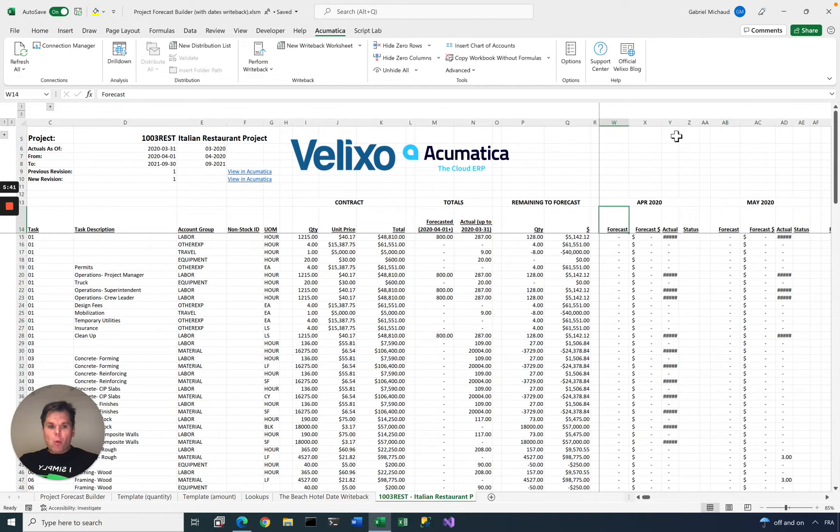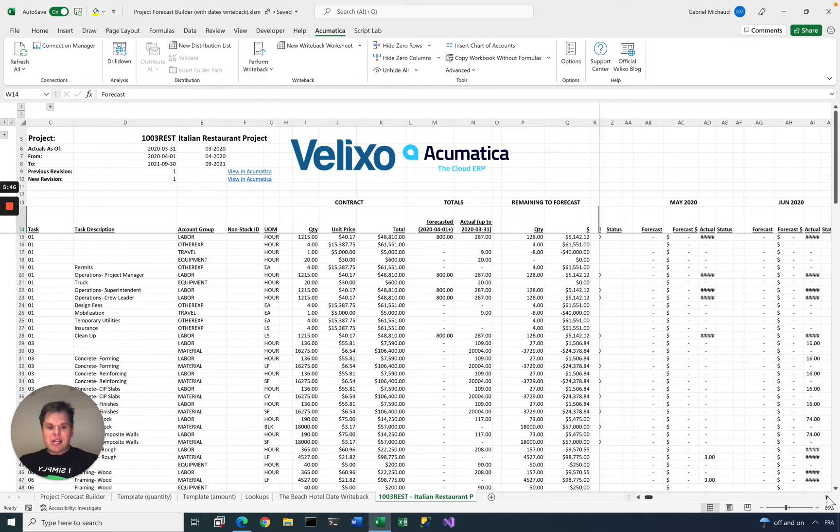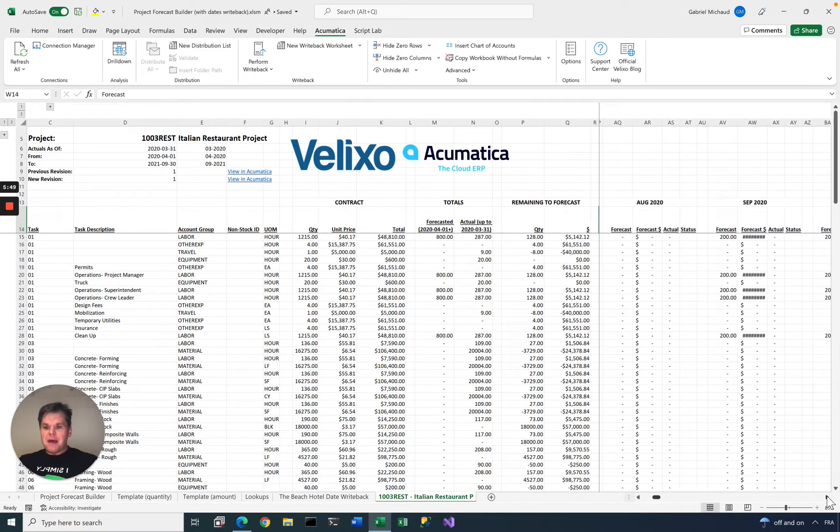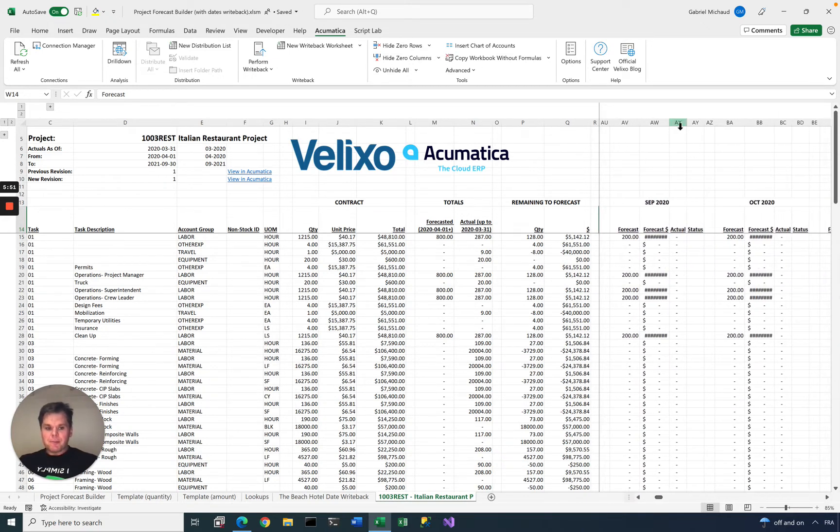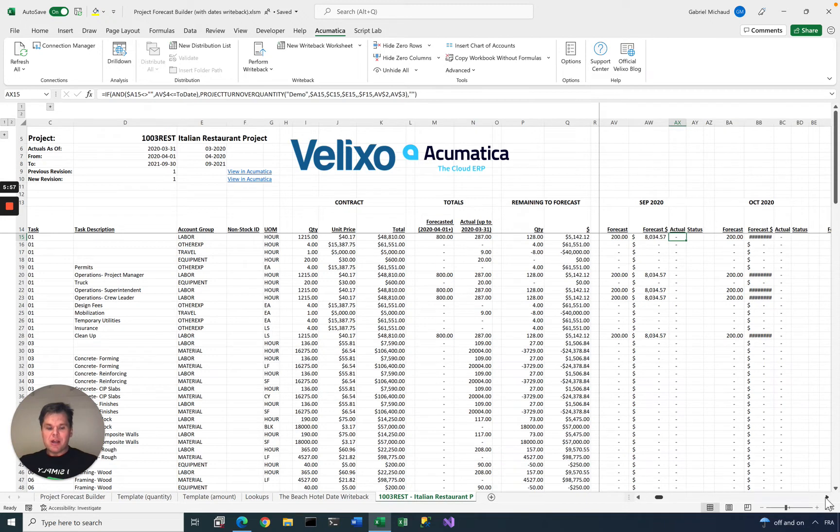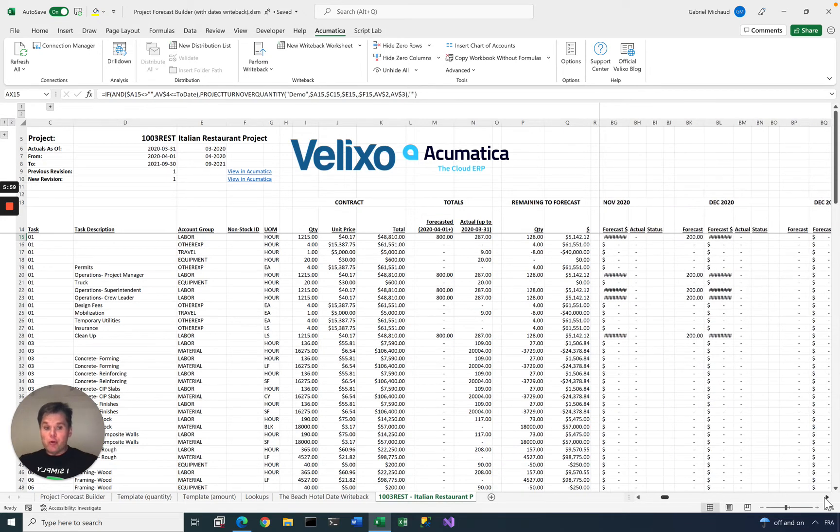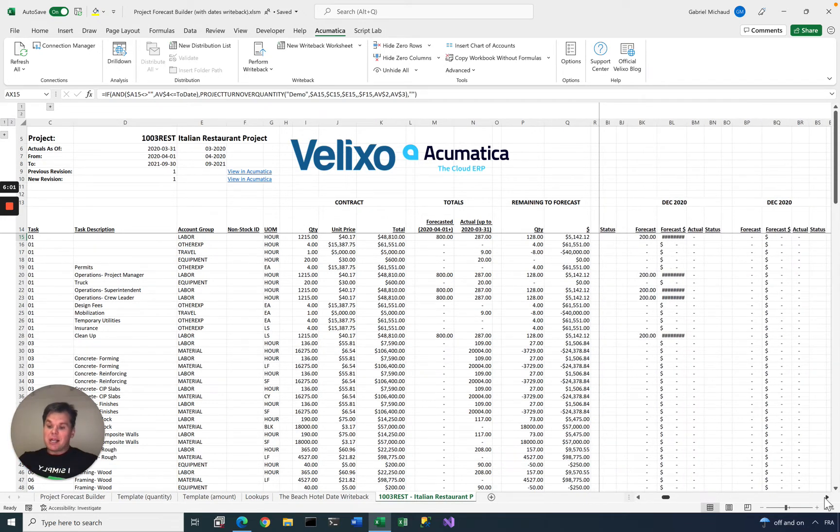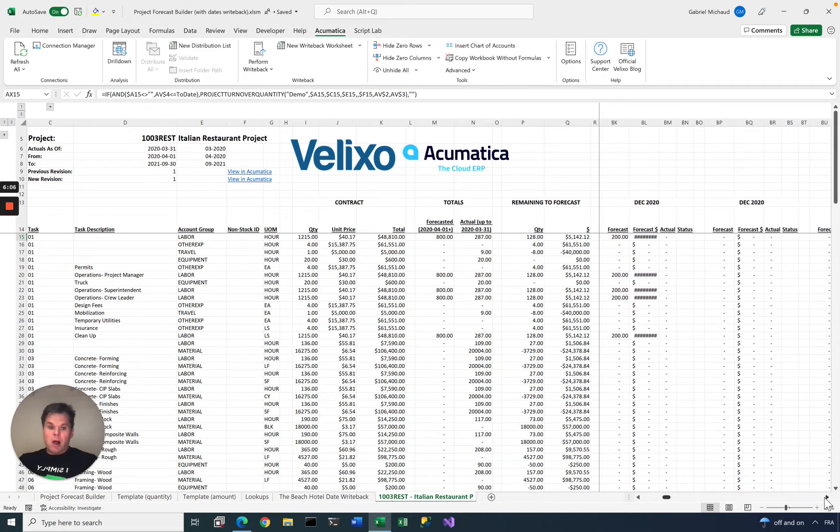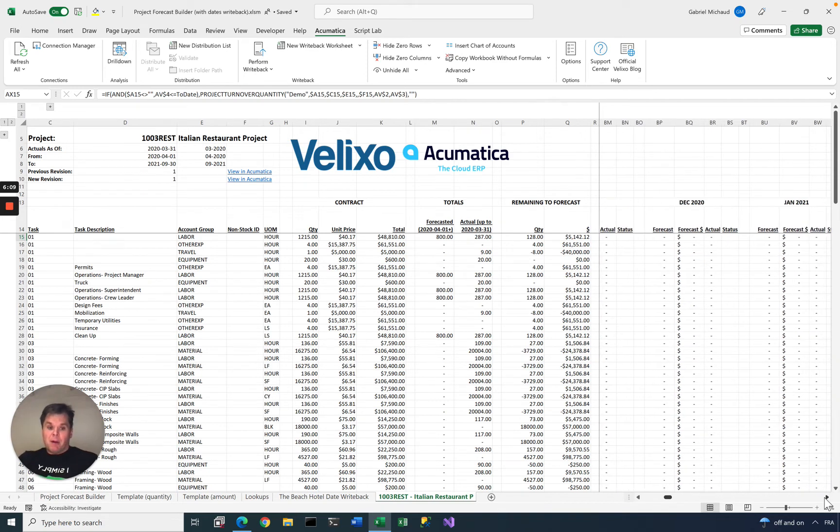What you end up with is a spreadsheet with all the different tasks and account groups, and then you have a set of columns for all the financial periods that are in your forecasting horizon. You not only see the current forecast, but also the actuals. So if you have actuals, you can look at them and then use that to forecast next month. If you have the same capacity, you planted 600 trees last month, you're probably not going to be able to do 2,000 this month. So it's helpful to have the actuals next to your forecast when building this.